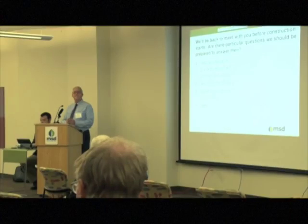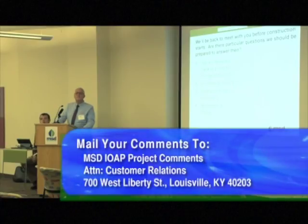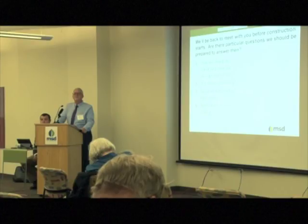Yes, ma'am? Back to your blasting question, on the basis of the Clifton Heights blasting, the number of people who were notified of the imminent blasting was too small. The people who actually felt it were in a much wider area. So MSD needs to think about letting a much wider area know when they're going to be blasting. Okay, thank you, ma'am.